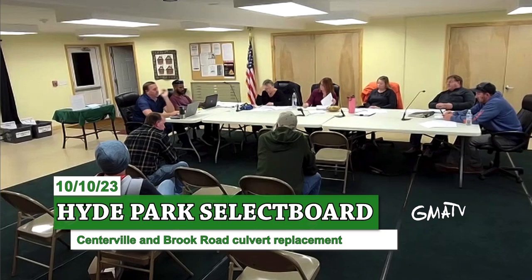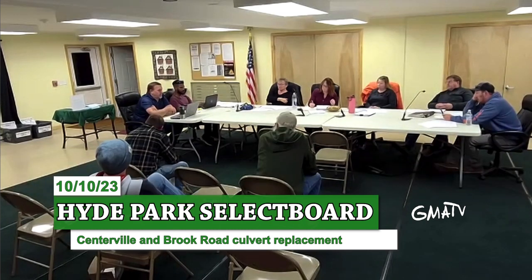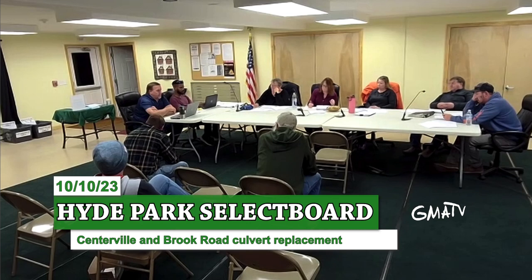So Brook Road, just to give you a summary of this whole project. Brook Road itself was awarded at $332,000. No change in number one, because that applied to Centerville. So with this change, the new cost is $339,500. Centerville Road was awarded at $408,000. That was a total contract award of $740,000. Now, culvert for Centerville is $409,590, and the total contract is $749,090. So that is the current story.